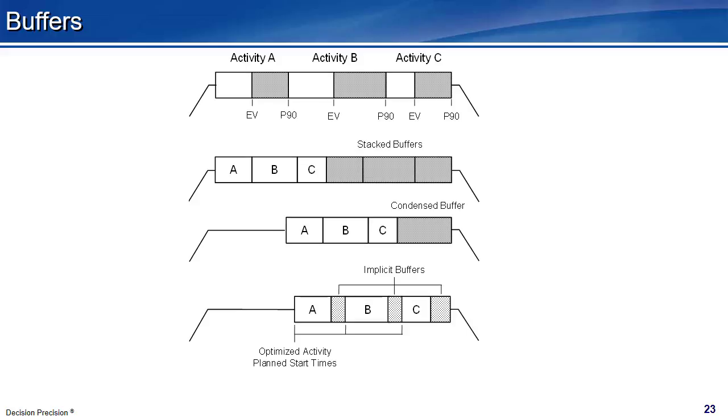If predecessors complete before a successor activity is ready, there is a delay in assembling workers and materials. Similarly, workers and materials may be in place to start an activity before all the predecessors are complete. Then there is the cost of an idle crew and perhaps unnecessary site congestion. There are no express buffers, though normally there will be planned gaps between activities.